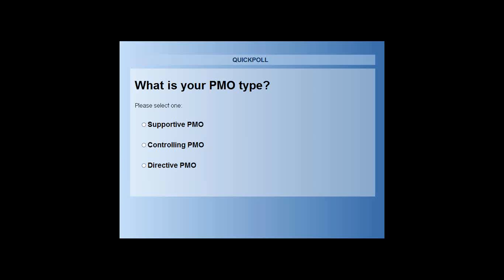To have that structure, that process put right, is crucial to the success of a PMO in a functional organization, because you'll have those functions, business units, departments, whatever you want to call them, with resources owned by the head of that unit. PMOs, directly or indirectly, would want to utilize those resources on project-related work while they are governed and managed by other people and usually busy doing their BAU activities, their daily job, whatever that is.